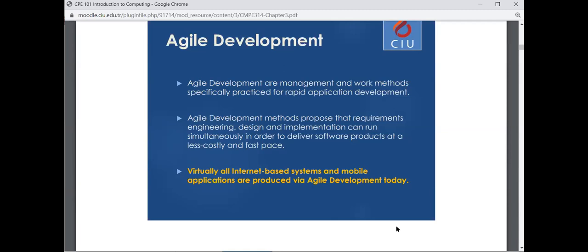And more importantly, you go on smaller cycles rather than having a big cycle for, let's say, you got to deliver a project next year for, I don't know, 31st of August or something. You have smaller deadlines, and it is like 3 weeks development cycles or maximum a month, and then the software is released, and then you work on the next phase. That is how agile development works. So you take these steps as fast as possible in a fast changing environment and rely on the user responses to address the next version in the next cycles.